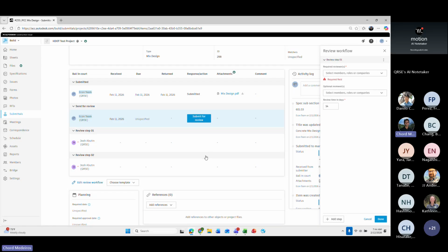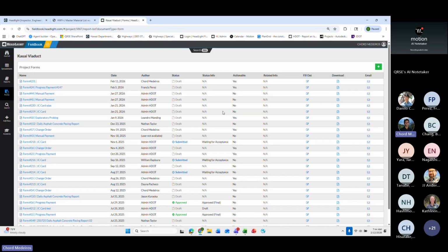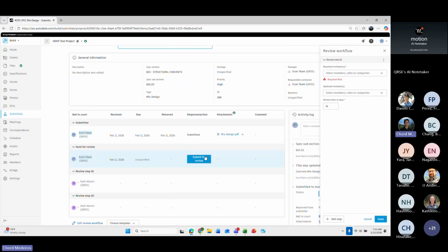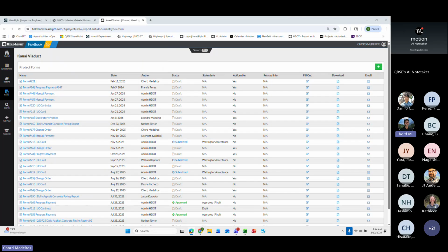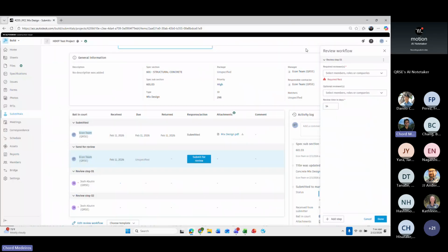But I just wanted to make note that what a lot of us do in our projects, and what we say is best practice, is instead of leaving the submittal in submit for review and then totally taking it out of ACC and conducting the review in Headlight, in order to communicate with both the contractor and also our own project team, or whomever else is taking a look at the project in ACC, that it's currently with lab, because right now, obviously, ACC and Headlight are separated. They don't necessarily have a connection to each other.